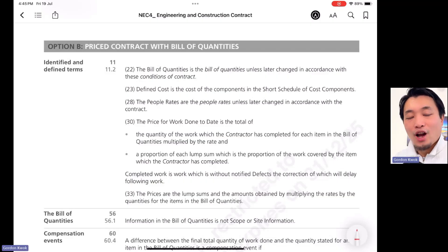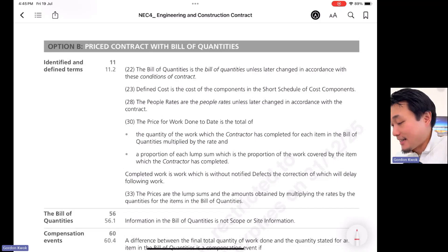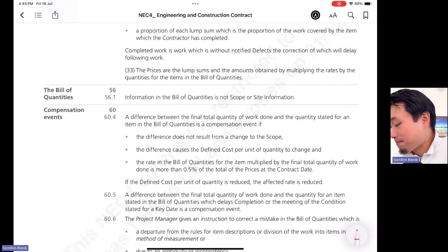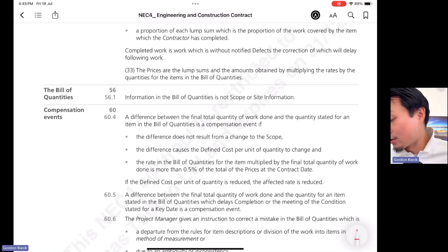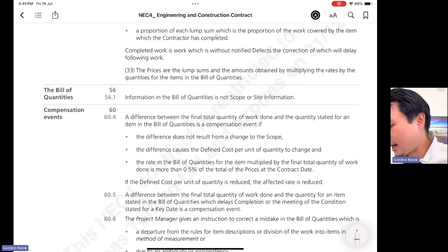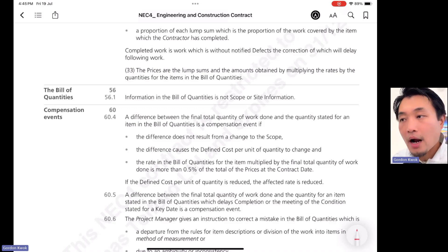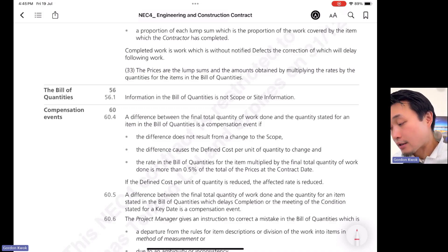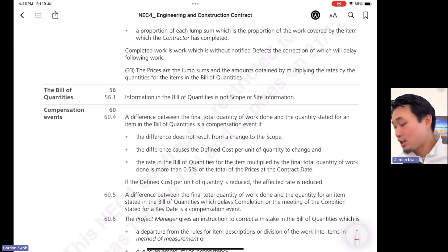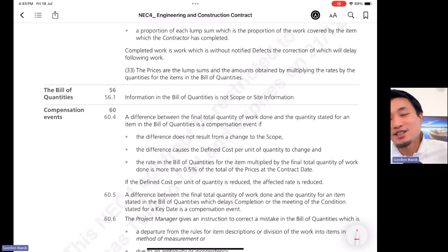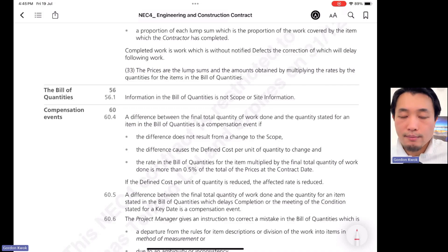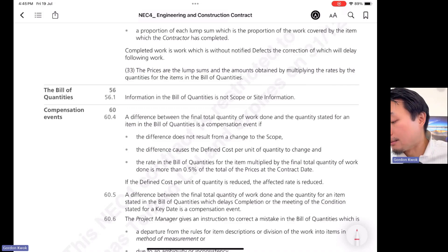On screen we have Option B — price contract with bill of quantities. Going to clause 60.4, it states: a difference between the final total quantity of work done and the quantities stated for an item in the bill of quantities is a compensation event if three criteria are met. The first criterion is that the difference does not result from a change to the scope. If there is a change to scope, use clause 60.1(1) instead — the project manager will make a decision there.